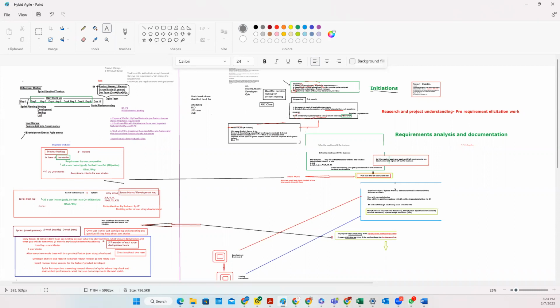All the stories of one feature should get done within one sprint, within 10 days. If it is bigger than that, then we have to split that feature. And for a user story, the acceptance criteria should usually get done within 8 hours or one day. If it is bigger than that, then we might need to split it into two.